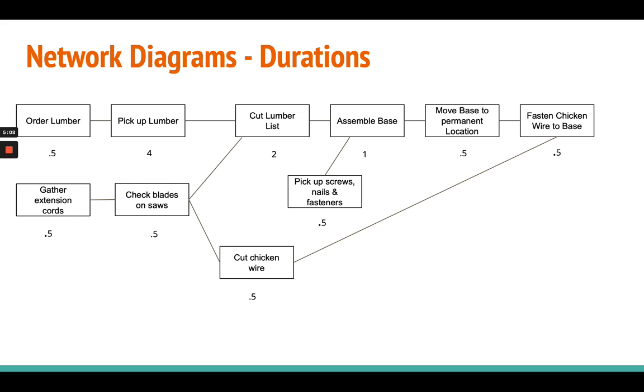But for me, this is a little home project. I wanted to make sure I had enough time, and I didn't want to get into the hours of things. So I wanted to just make sure, at the most basic level, I was always going to have half a day allocated to any activity. If it deserved its own Post-it, it deserved half a day. So ordering lumber, yes, it took me less than an hour, but I allocated half a day to it. So right here, you see half a day.